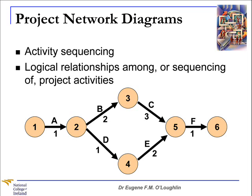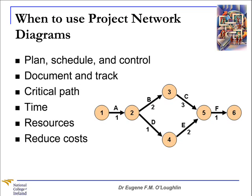So when should you use a project network diagram? Well, they're very useful tools when you are planning a new process, or if you're involved in improving an existing process. For new processes, you will have to determine the logical sequence of activities for any solution that you propose. And we do this because activities often cause scheduling problems on projects. For example, if you have two activities requiring the same resource, they cannot be completed at the same time. So we want to use a project network diagram when we are planning, scheduling, or controlling a new program or product development effort.